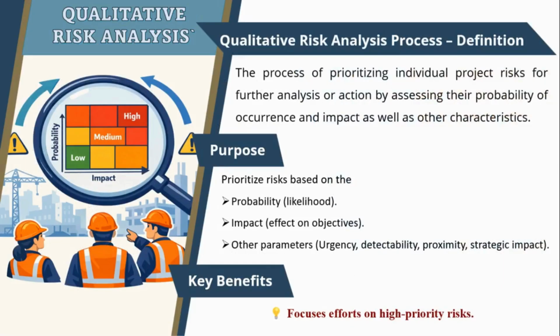So, what is qualitative risk analysis? It is a structured process designed to determine which risks require immediate action and which can simply be monitored. At this stage, we are not calculating precise numerical values or complex statistics. Instead, we focus on prioritization using professional judgment and systematic methods. This is achieved by assessing the likelihood of occurrence and the potential impact on project objectives. We also consider factors such as urgency, detectability, and strategic importance.